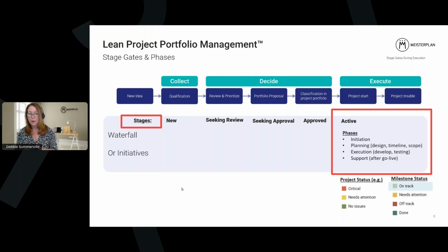Now, during the demo, I will also show a new feature for milestone status. These statuses are currently fixed to the 4 answers you see here on the screen. Milestone status will not update any overall project health field. We do assume the project manager still needs to assess the overall project health from many factors, whether it's milestones maybe being off track, financials, and other things. So you'll see the new statuses, but how they work independently.